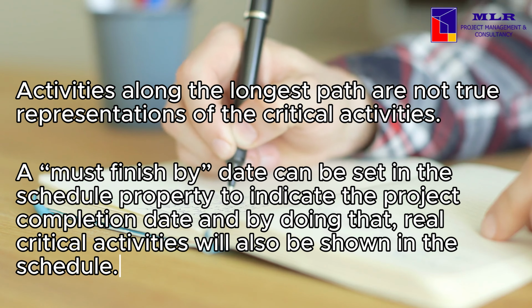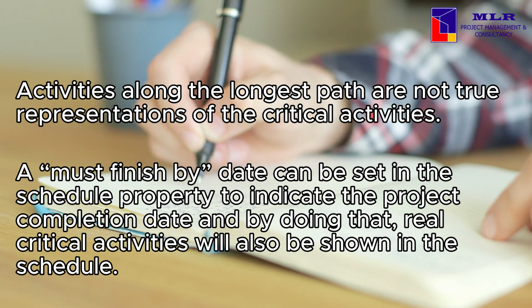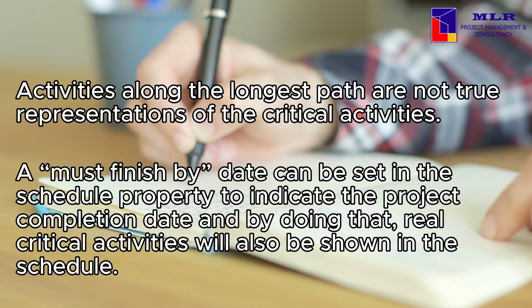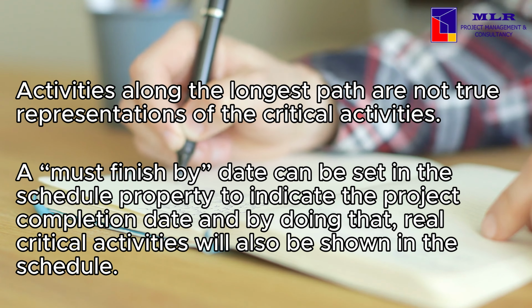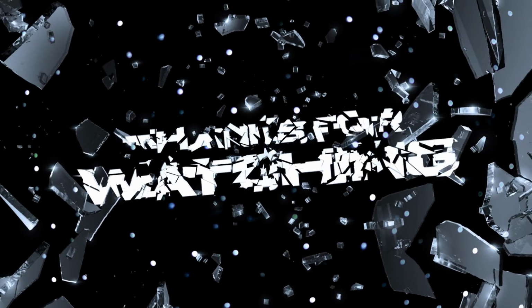Fourth, a must finish by date can be set in the schedule property to indicate the project completion date, and by doing that, real critical activities will be shown in the schedule. And that ends the presentation.